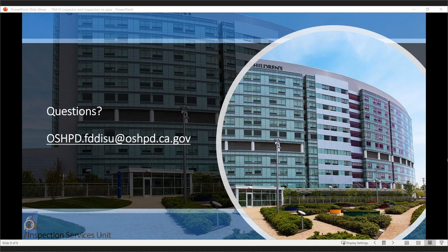Well, I would first want to get my biggest bang for my buck with mock-ups by mocking up whatever detail happens hundreds and thousands of times, so you get it right up front. If you're only going to be doing a detail once or twice, there's probably not a good percentage in doing a mock-up of something you're only going to do one more time. Just do it right the first time.